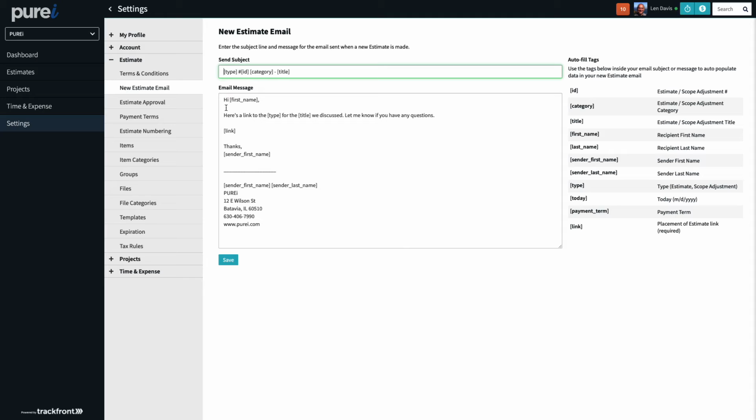So here, as you can see, the subject of the email says it's the type of estimate, the number, the category, and the title is what shows up in the subject. You can customize this to however you want. And then you say, hi, first name. Here's a link to the estimate for the project title that we discussed. Let me know if you have any questions. The link to the estimate will show up as a button, and then you say thanks, sender first name. That would be yourself, and it's basically like a form field in lots of other word processing programs. So this becomes very customizable and automatically gets filled with the right information every time you send an estimate.